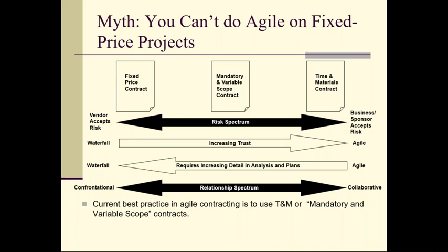So we're trying to have a fixed price for the entire project. That first phase, pretty straightforward. It's business as usual. It's old-fashioned project estimating. Essentially, you're treating it almost like it's a waterfall phase, right? So we say this mandatory scope is going to take us 6 months and $600,000, and that's with your built-in contingencies and everything. That's the price and the timeline for that first mandatory scope phase.